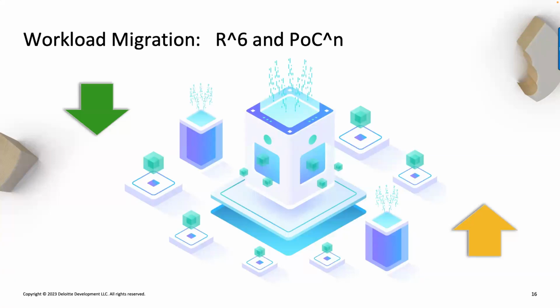Looks good on paper. Can it handle your scalability, performance type of requirements? That's where you spin up 2 people, 3 people, look at it, document the use case, document the success factors, give them 2, 3 weeks, 4 weeks, come back and report, right? If it looks good, great. We include it in our architecture design and continue. If it doesn't, it stops there, right?